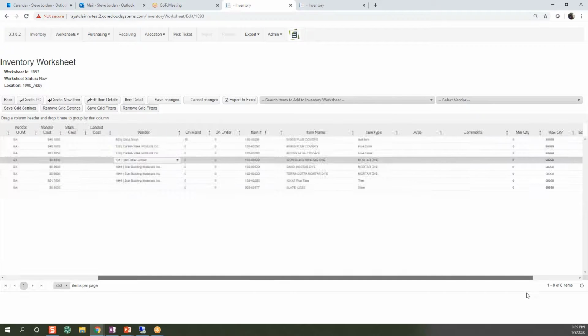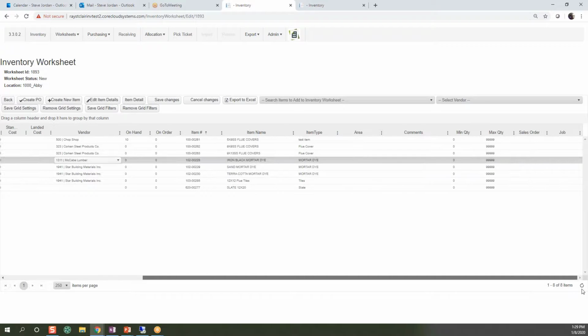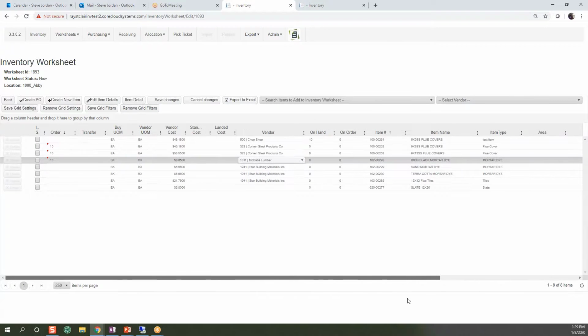Then on this side, it's going to tell you what sales order it is associated with. So all the purchase requests that come off the work orders are going to come into a worksheet. Your purchasing person can sit here and use this as an interim tool so that they can manage these requests from the field. Now, you may also have the field just say, hey, I need to buy a piece of this from Johnny's Body Shop. Well, that's just a straight PO that goes into purchasing. But this worksheet is just one method of purchasing that we actually do.